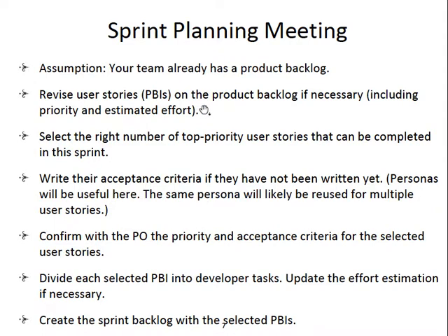So of course we will say later that in the middle of the sprint we don't let the customers change their requirements, but between sprints, so after one sprint and before the start of the next sprint, we allow them to give us a revision of the user stories on the product backlog.